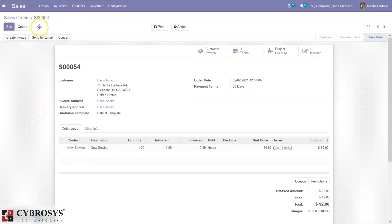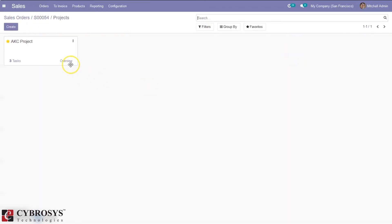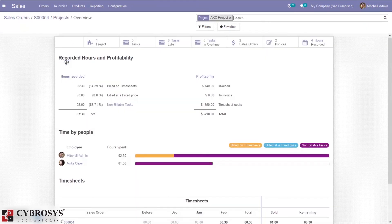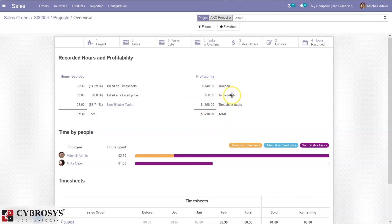Now if you check the project overview, you can see the billed on timesheet rate has changed to 14.29%, the total time spent is half an hour, and the total amount invoiced is updated to 140. The timesheet cost is also updated, and the overall profitability has changed to negative 210.